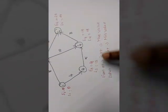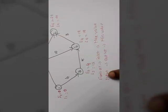Earliest time note down your inlet and your maximum value and latest time note down your outlet with your minimum value.